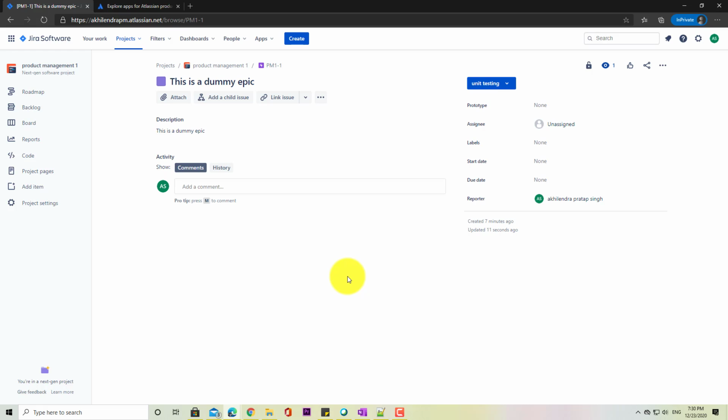So especially for a Scrum Master, it is very important. If you are just saying that a user story is in to-do status, it is essentially indicating that development has not started. But we don't know whether that user story has been groomed or not, whether it is pending for some other information, some clarification, product owners have added all the required information there or not. So you may want to add these additional steps there, which could add values.